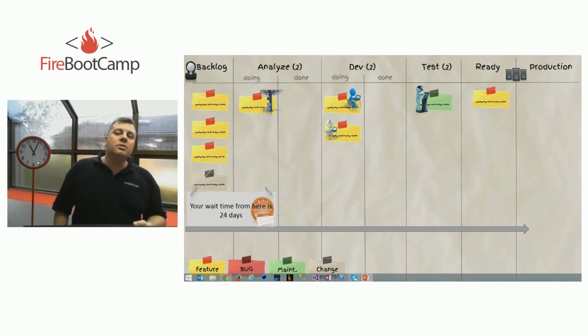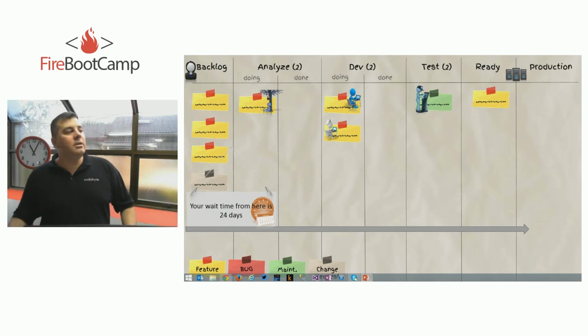One thing you need to be careful about is your user story sizes, because if they're in different sizes, then you're really comparing apples to oranges, and that doesn't work. So you try to keep them as small as possible or at the same size as possible.